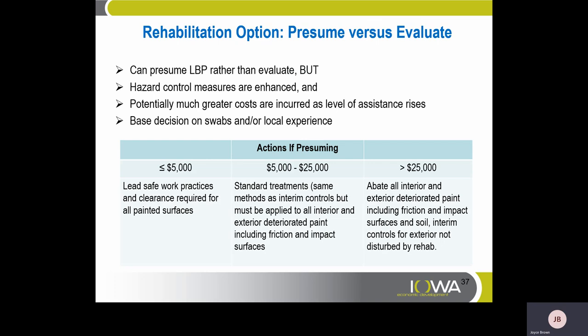Rehabilitation Options — Presume vs. Evaluate. You can presume lead-based paint rather than evaluate, but hazard control measures are enhanced and potentially much greater costs are incurred as levels of assistance rise. For projects under $5,000 when presuming: lead-safe work practices and clearance required for all painted surfaces. For $5,000 to $25,000: standard treatments — same methods as interim controls — applied to all interior and exterior deteriorated paint including friction and impact surfaces. For projects greater than $25,000: abate all interior and exterior deteriorated paint including friction and impact surfaces, and soil interim controls for exterior areas not disturbed by rehab.